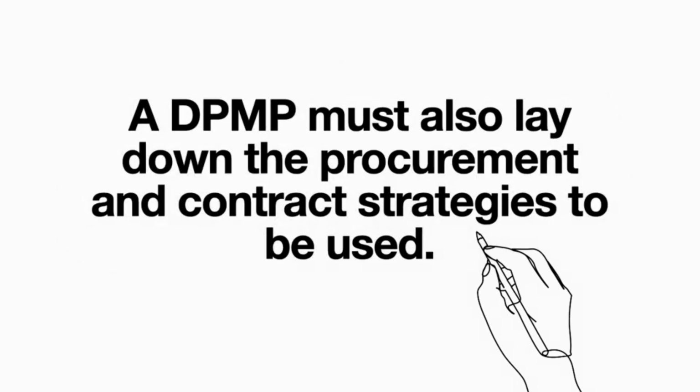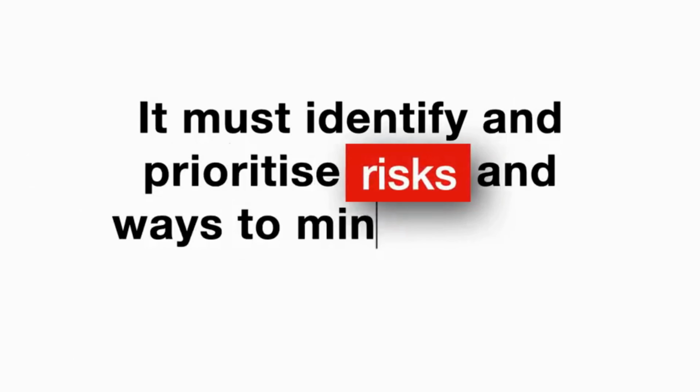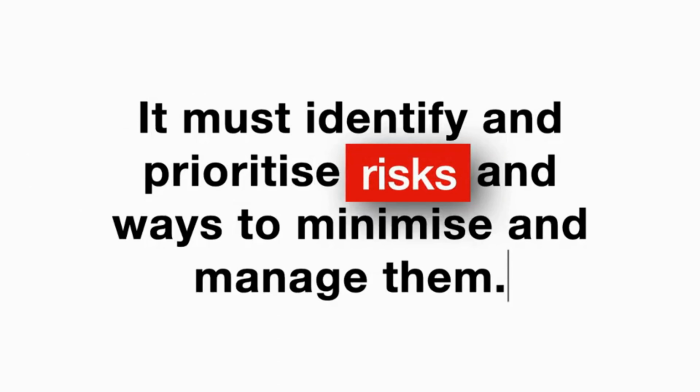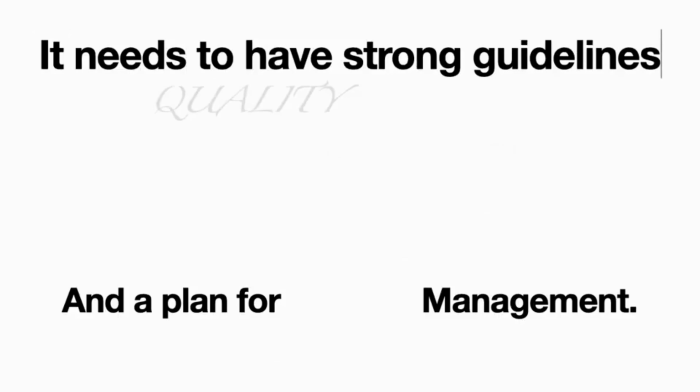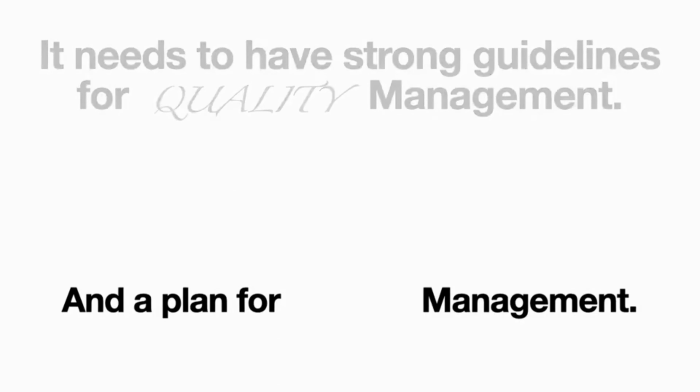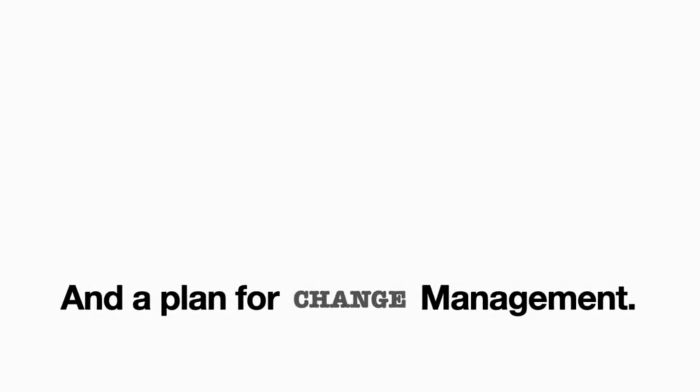A DPMP must also lay down the procurement and contract strategies to be used. It needs to identify and prioritize risks and ways to minimize and manage them. It needs to have strong guidelines for quality management and a plan for change management.